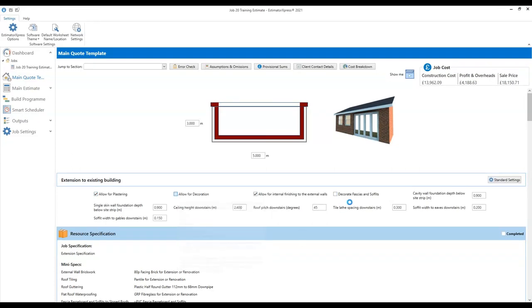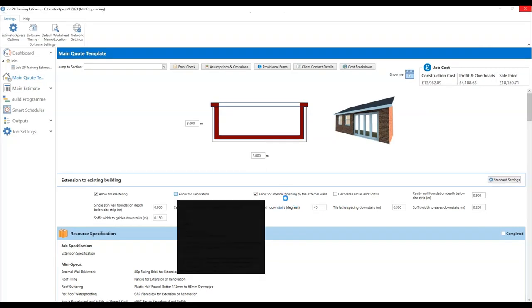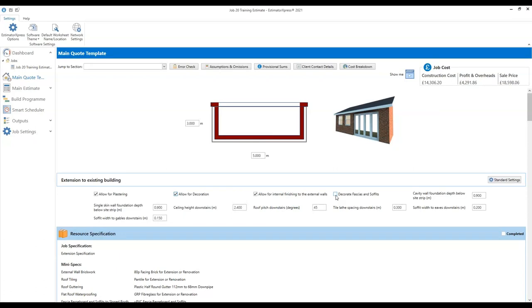I'll also tick decoration. Internal finishing for the external walls, we'll leave that ticked as well. For decorate fascias and soffits — if you are going to be using UPVC ones, we will leave that unticked. Then we can look at the cavity wall foundation depth. As standard it's set to 0.9 metres, but let's say we need slightly deeper foundations for this project — I'm going to change that to 1.2 metres. As soon as I click elsewhere on screen, that dimension will revise the construction costs at the top of the screen.